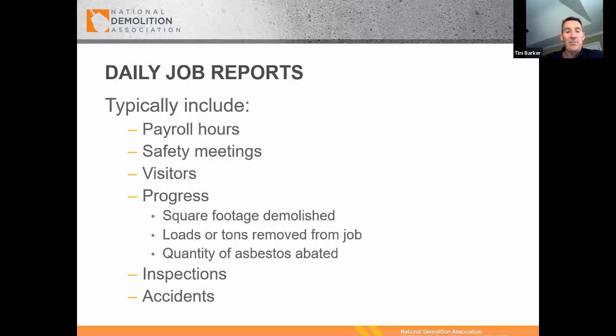So these reports are very important. It's great to keep very detailed reports, noting the hours, any visitors, weather, progress, what was completed that day. Invaluable tools, especially for estimators, to be able to go back and understand what occurred and where you did very well, maybe substantially better than the estimate or worse. And so looking at this information is very helpful.